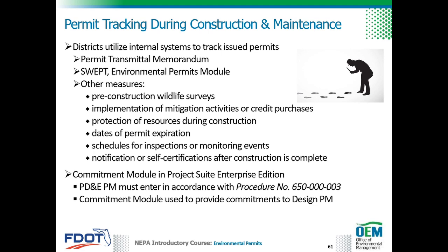In addition, SWEPT includes an environmental permits module that allows the district permit coordinators to track permitting information, including applications, requests for additional information, issued permits, and mitigation requirements. It can also create the Permit Transmittal Memorandum.